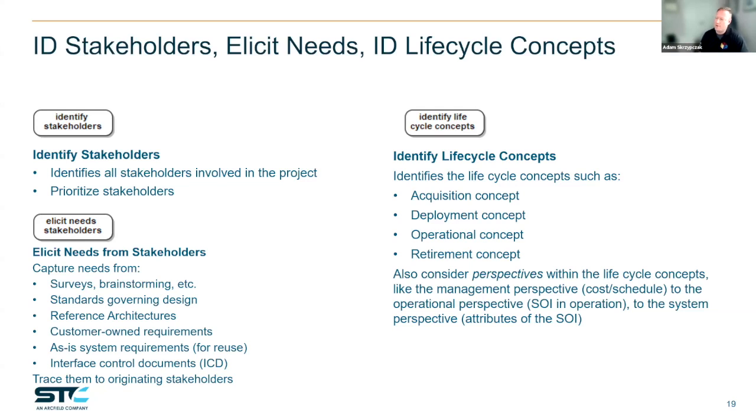And it's a bit recursive, but as you identify those life cycles, you may identify stakeholders you may not have talked to. So if you're talking about your maintenance life cycle portion, you may have to talk to maintainers and get their feedback and get their needs. So I really like that step. I really like incorporating that into the process because it really helps from the completeness perspective of creating that set of needs.